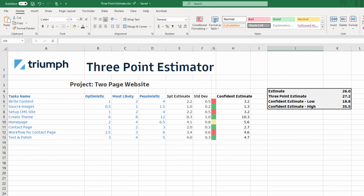On top of that, notice the little color codings, the red, the green, and the yellow. That's signifying and highlighting, hey, you don't feel very confident about these items. And that's not bad. That's actually good. It's basically telling you these are the ones that you feel less certain about. So you might put more attention to them, which in general is going to bring them in a shorter amount of time. The more attention you give to them, the more thinking you put towards them, the more likely you're going to hit that likely number and not the pessimistic number.